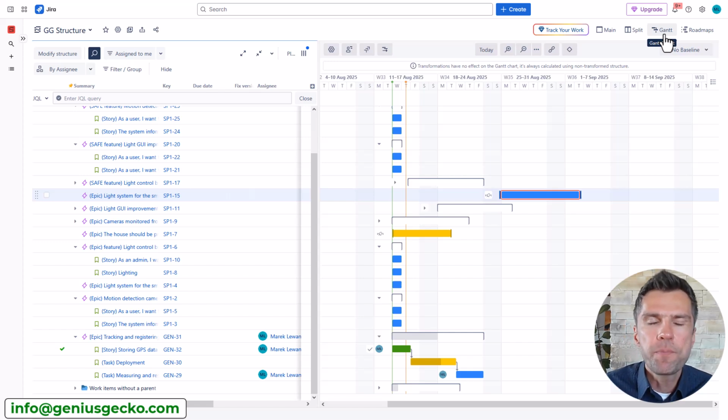Once it is installed, you will need to do several things to configure, which I also explained in the Structure video. But long story short, Gantt uses several Jira fields to actually visualize data on the timeline. One example would be the starting point and the ending point. So the start date or end date, or the actual start, actual end date, depends what kind of fields you are using in Jira. Also, original estimate is quite an important field because it is used by Structure to estimate the effort, right, and also the workload of your resources.